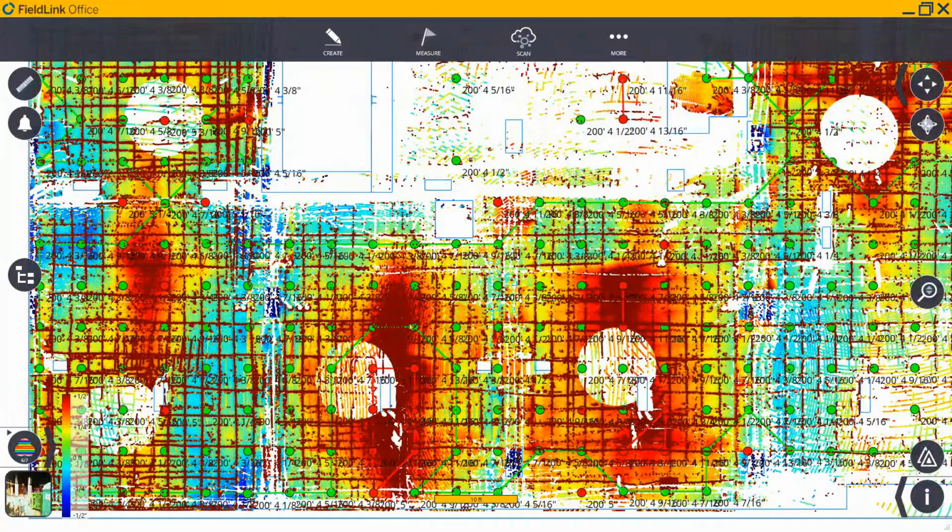So if we have to pour 8 inches, they'll usually have a depth stick to check to make sure they get the 8 inches every time, because that's really important for engineering. The formwork is going to affect the FFFL because they're going to have to put down 8 inches regardless.